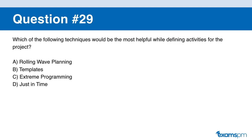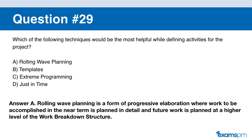Question number twenty-nine. Which of the following techniques would be most helpful when defining activities for your project? A: rolling wave planning. B: templates. C: extreme programming. D: just in time. If you said A, you are correct. Rolling wave planning is a form of progressive elaboration where work to be accomplished in the near term is planned in detail and future work is planned at a higher level of the work breakdown structure.